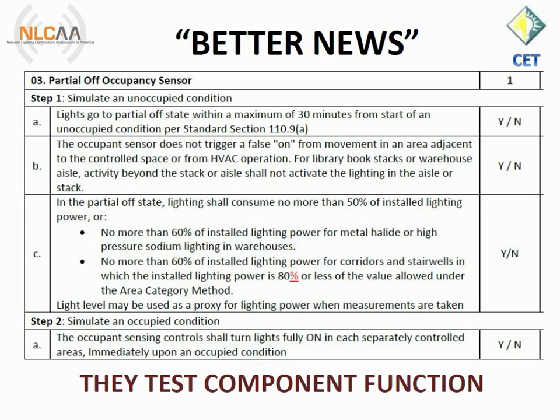These are places where it would be outright unsafe to have all of the lighting shut off at any time. So under 130.1 Charlie 7, the tech just checks the shut-off control for the part-off function, and that's it. For areas under 130.1 Charlie 6, the second shut-off device for the area has to be tested as well for the final pass-fail.